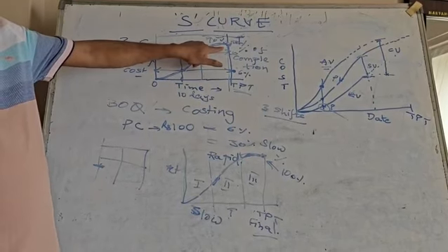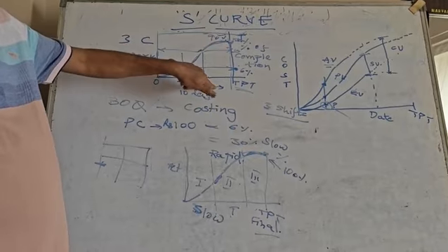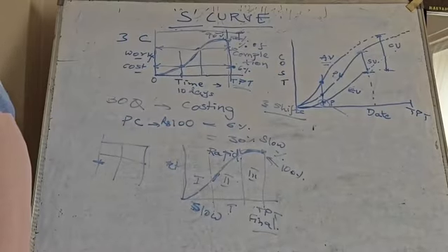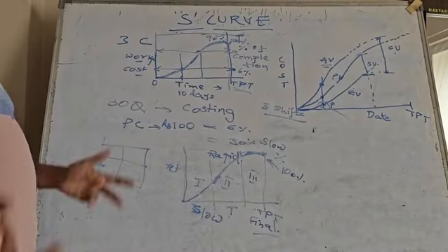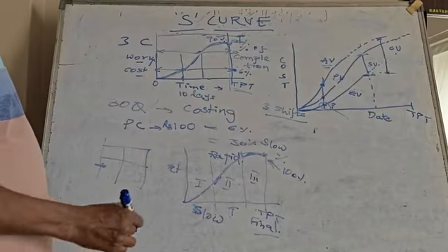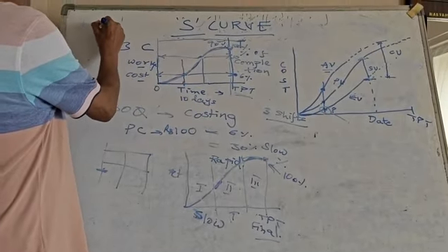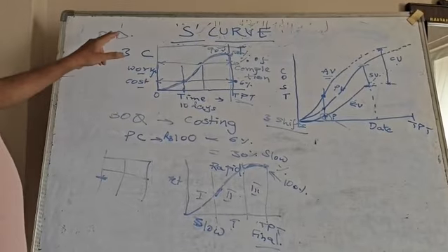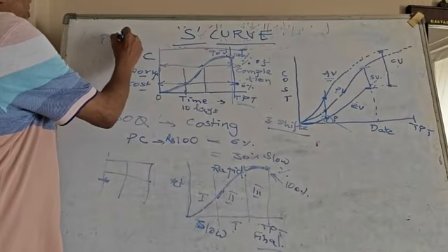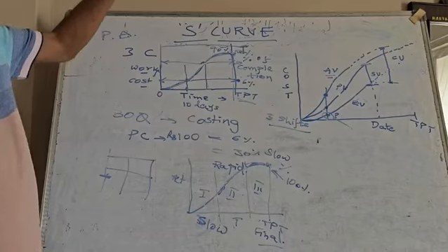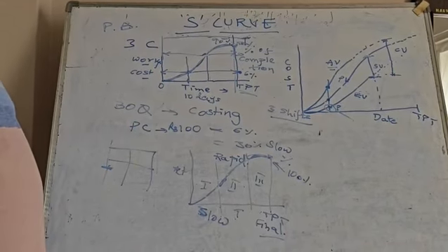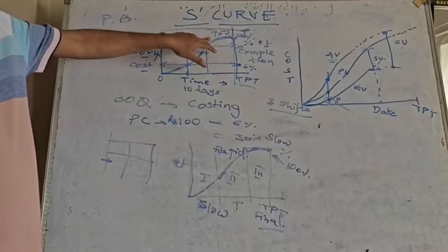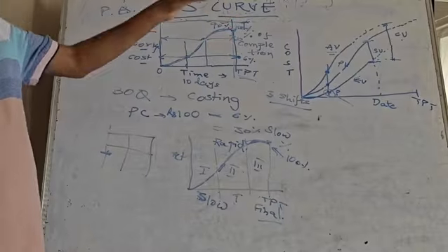Once you write this, 10 rupees he will keep, the owner, the client, and he will be waiting till 1 year is over. Now for big projects, 10% means a very huge amount. And also it reflects into a performance bond. The contractor is asked to deposit the performance bond of the company, what he has. This also we'll try to cover in the tender document once we go to that chapter, where the performance bond and also this 10% of the cost, that is maintenance cost, will be retained by the client.